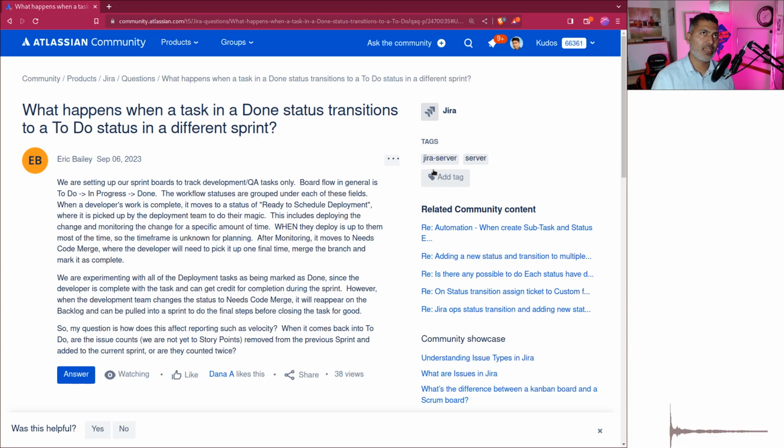And I don't really see any reason, although I also mentioned that it is not always feasible, but just try to create 3 tasks straight, like upfront. And you can of course use automation. And if you're on Jira Data Center, then create those stories upfront all the time. Like if you have a story, then create a dev task automatically, or a test task, or something else when it is closed. And it also depends on at what level you're doing testing. Are you doing testing at the story level, or are you doing testing at the epic level?